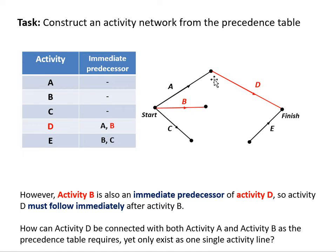Now this is impossible. It can't be at two places at once, and we can't draw an activity twice. That's one of the rules of these activity networks. You can only draw one line. So we're at a bit of a problem here. How can we possibly connect A and B to activity D with a single line?